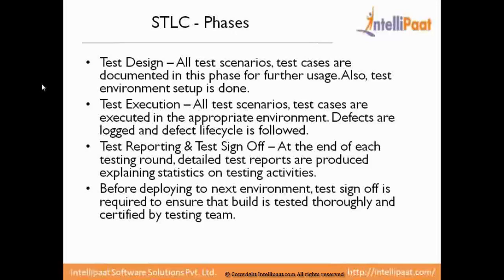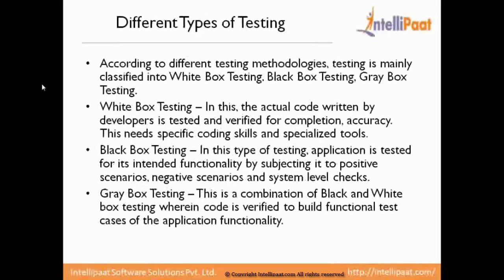Finally, the test reporting and test sign-off phase is triggered. At the end of each testing round, a detailed test report is produced giving statistics about what was tested, what was not tested, how it was tested, what defects were reported, and which test cases were executed or not. When delivering the application to the next environment — staging or production — the testing team provides a test sign-off report with a go or no-go decision determining whether the particular build should be deployed to the next environment, along with any risks the testing team wants to highlight.